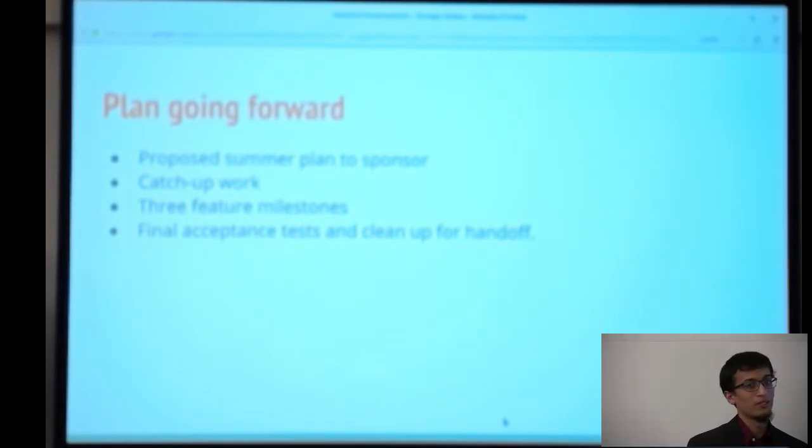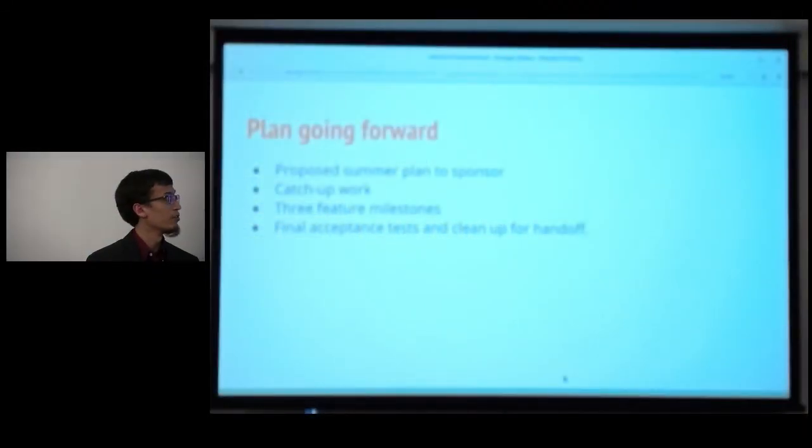And so that gives us some buffer time at the very end of the summer in case there's any schedule overruns, and also to run our final acceptance tests and clean up the code and documentation for handoff.